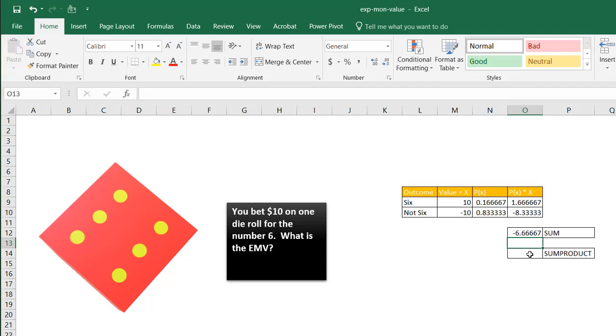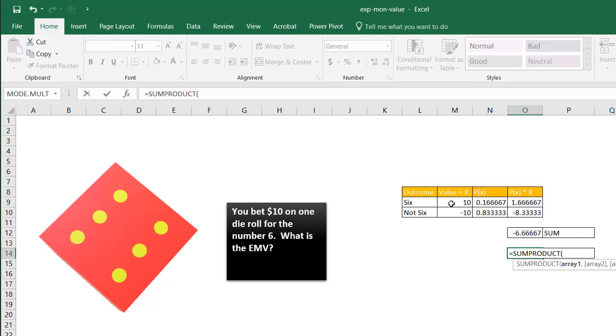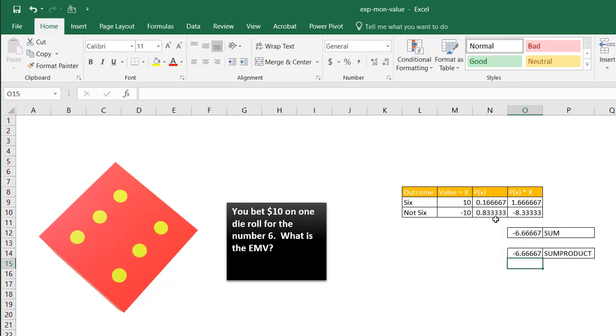So basically, when you think about it, negative $6.7. And of course, instead of doing all of this calculations and having the sum function added, you can always just use the sum product function to do that. So sum product, my first array is this, comma, my second array is that, press enter, and we're going to come up with the same value as that, right?